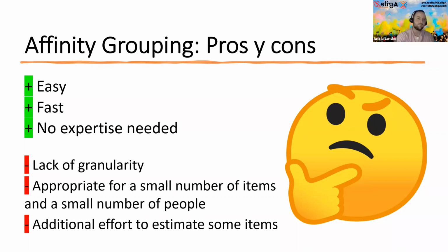And I think the same thing happens in Agile. It's just smaller scale. It's time boxed to the length of your sprint. What part of the requirement can you do in 2 weeks, if that's your time box?